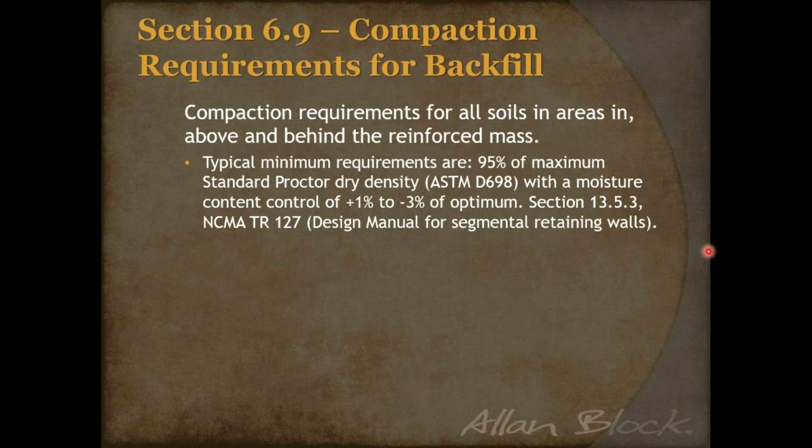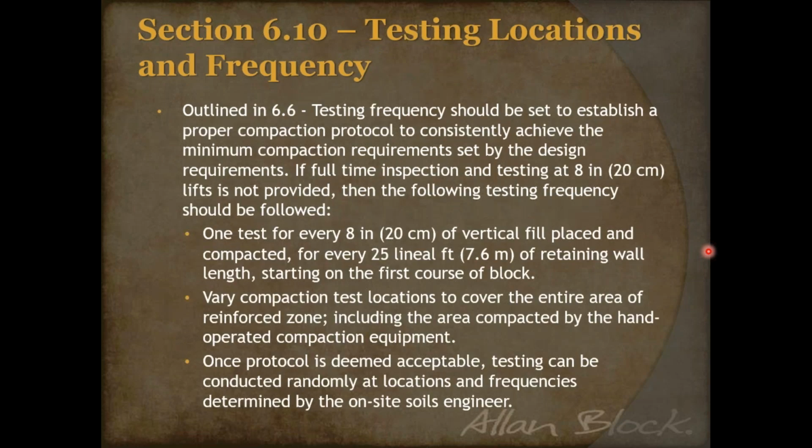The testing locations and frequency, this was interesting for us. We started going through our best practices manual and creating this in 2014, I guess, because we released it in 2015. And I've got to admit, this was where a lot of us were silent on how often you should test. What frequency should you do? So we started contacting some of our go-to engineers out there and guys in the industry. And a lot of times this is where others kind of peeked in as well. The guys would say, yeah, it needs to be 95% standard proctor and it must be tested, but nobody really qualified what those testing requirements are.